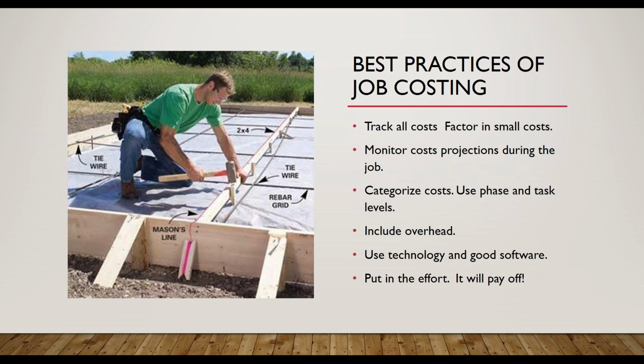Monitor the costs during the job. Field reports by your project managers, or whoever's acting as the project manager, become crucial in this whole thing. Once you get in the habit, it can be as simple as just a few minutes each day while it's fresh in your mind. So assign the job, the phase, or cost codes in these field reports. Put in a brief description, and it's an excellent log of your job. Don't forget the overhead each time. Overhead is crucial in this.